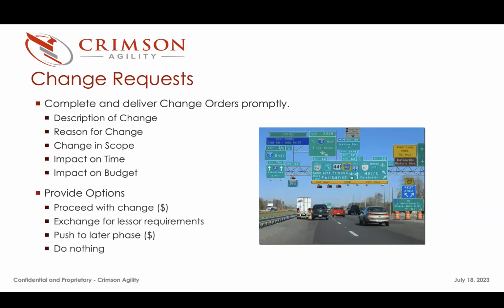Again, you're taking all of the options off the table for the client. It's not a best practice. It's actually a failure of scope management or change management, when you come in and you say, this took us longer than we expected, right? Now you're coming in after the fact, the work's been done. Client doesn't have options to do nothing. They don't have options with proceed, exchanging out other requirements. Well, I guess they could, but it really takes the options away. And ultimately you're just telling them, we burned through all of the money. We need more money.